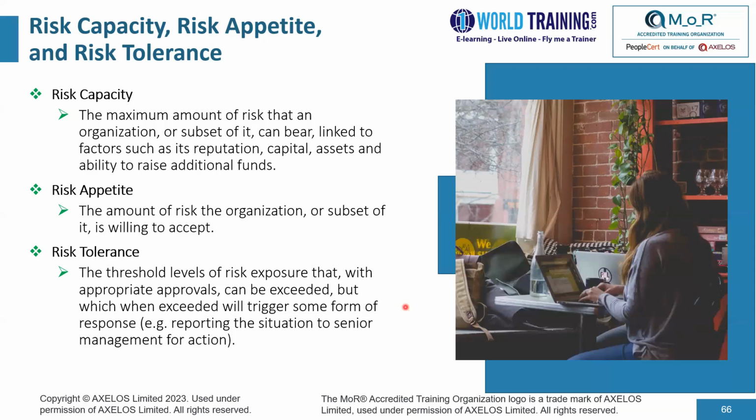For example, at the project level, the timeline provided could be that this project should be completed within 12 months, but we're going to give a tolerance of an additional 2 months. But if the members of the project board foresee that they could go beyond the agreed tolerance, then they would need to escalate that to the next layer of management.